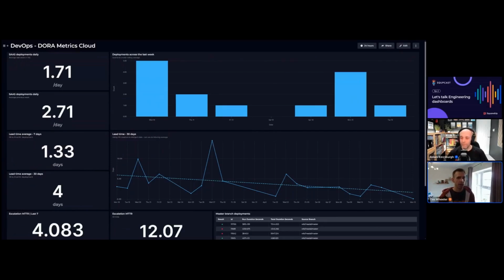What it's more useful at is where you're combining the daily deployments with maybe your lead time, with maybe your change failure rate. I don't have that on this dashboard, but I took it out because ours was 0 this week, which was lovely. Change failure rate is the number of times you fail to push something into production. So this is not a reflection of anything the developer's doing necessarily, like anything within their PR. It's as it goes through your gates, whatever those gates may be, pre-prod, maybe a beta, and then into the wild, if you like.